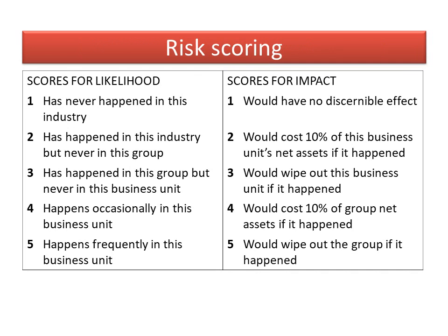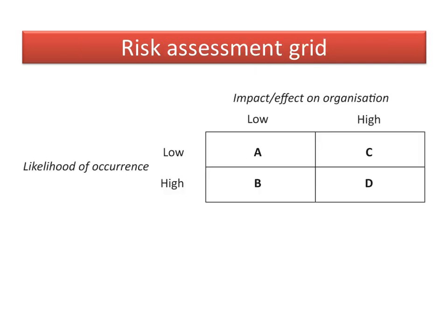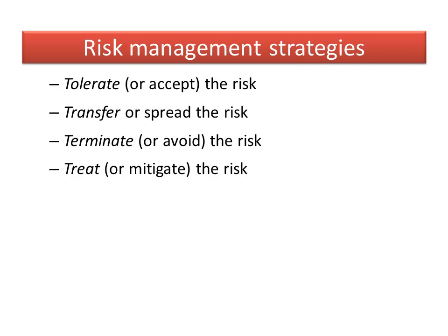We might need to measure the risk by scoring the likelihood and impact and producing the old impact likelihood matrix, where we have risks that we must address, which are in the high category, and perhaps risks that we just need to keep an eye on, that are in low, and perhaps we'll use the red, amber, green traffic light system to decide on price.